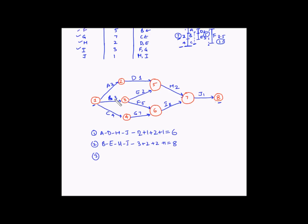The third path takes B to F instead of E. Path B-F-I-J has durations 3 plus 5 plus 3 plus 1, which equals 12 days.